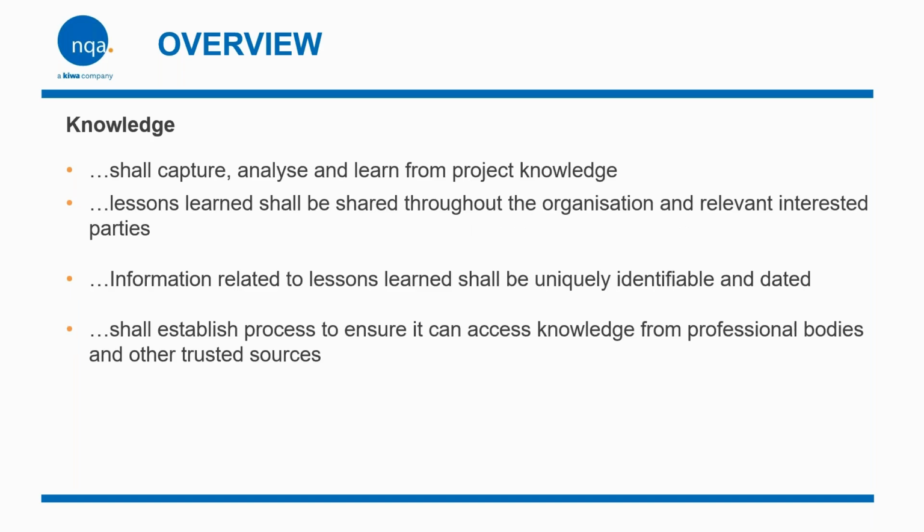Then you've got knowledge. It has to capture, analyze, and learn from the project knowledge. Lessons learned should be shared throughout the organization and relevant interested parties. Information related to lessons learned should be uniquely identified and dated, and it shall establish a process to ensure it can access knowledge from professional bodies and other trusted sources. So it's requiring you to capture, analyze, and document, and make sure you share the information. Coupled with accessing external expertise, this ensures the organization can learn and adapt and improve over time, which is key to sustainable and high quality project delivery.